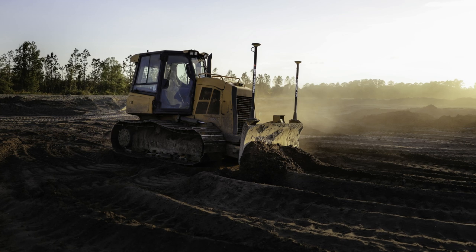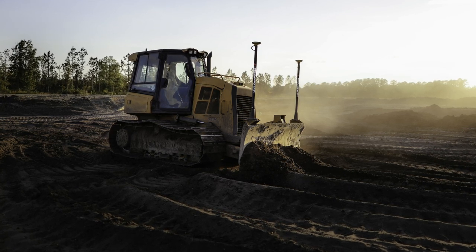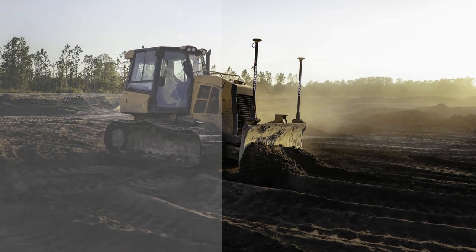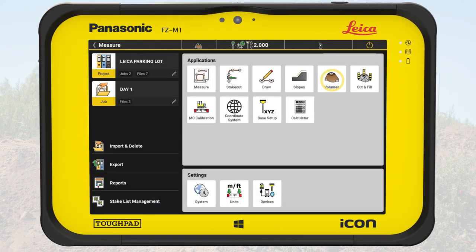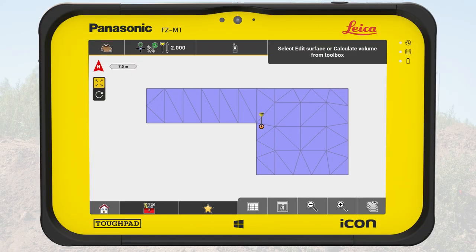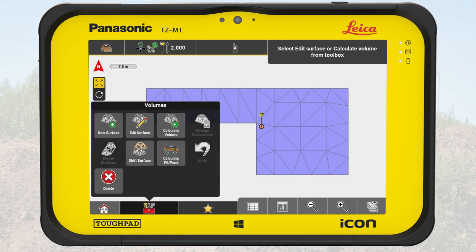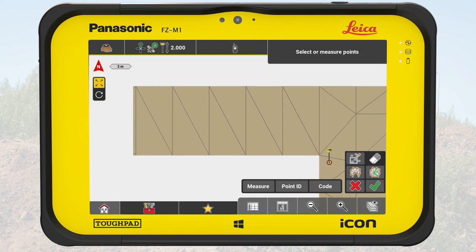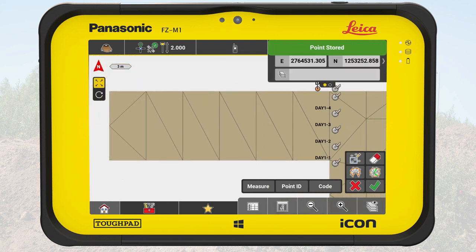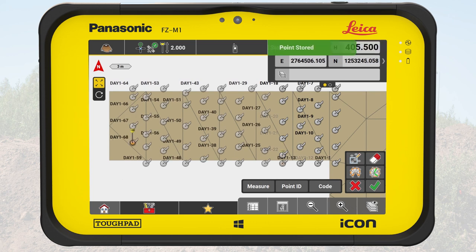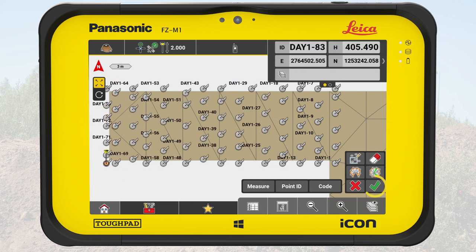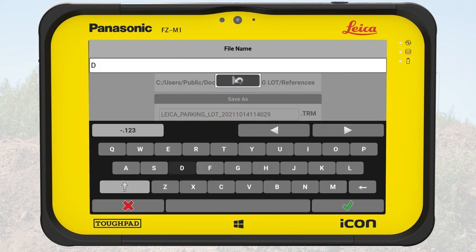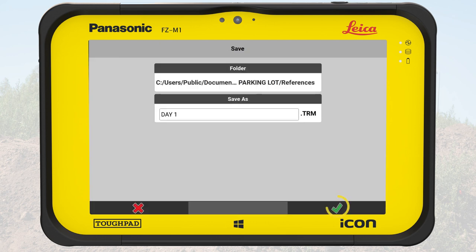Once the work on the field starts and the dozer has levelled out the first part of the parking lot, we will verify the new surface. The same way we did to survey the open field, we will create a surface of the now levelled part of the parking lot. This time we will measure the grid denser to get a more precise picture of the area. We tap on OK in the toolbar, name the new surface and finish the creation by tapping OK again.